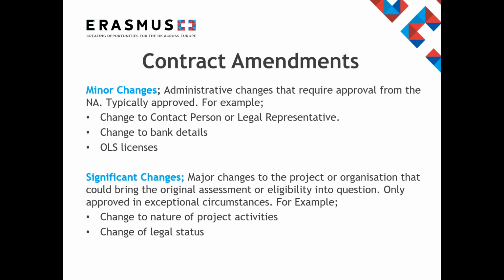Significant change requests are deemed exceptional and carry no guarantee of approval from the national agency. Some changes that cannot be permitted include those surrounding project budget, the reporting schedule, and change of beneficiary organization. These changes are not permitted. Moving on to the next slide.